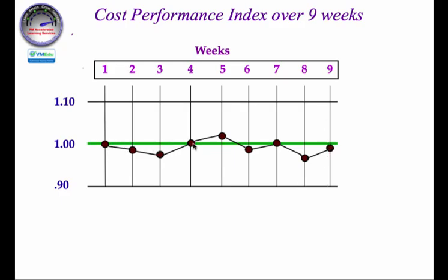Some might look at this and say, well, wait a second, we're not hitting 1. Remember that 1 is perfect, okay? And what we're doing is basing the actuals, and we're pushing those against the estimates to determine the difference in the performance between the two. So our estimates and our actuals are very, very close to each other, which means we did a great, great job of estimating.